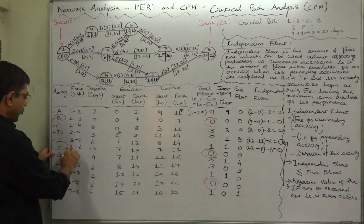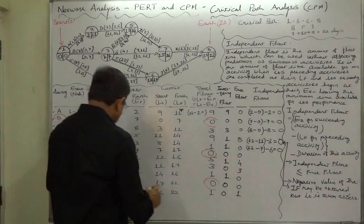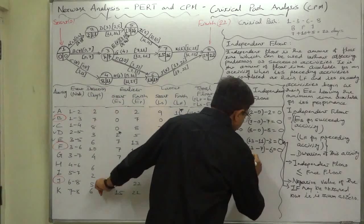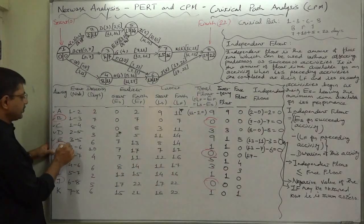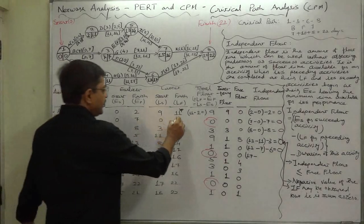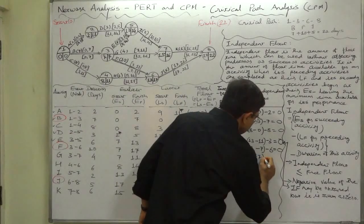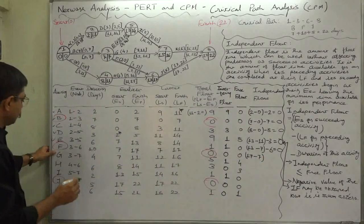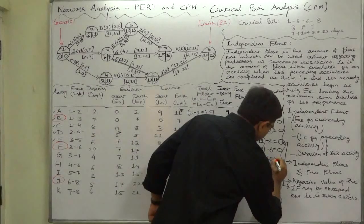Activity F (3,6): its immediate successor is J, whose earliest start time is 17. F's predecessor is B, with latest finish time 7. So: 17 minus 7 minus duration of F (10) equals 0. Independent float of F is 0.